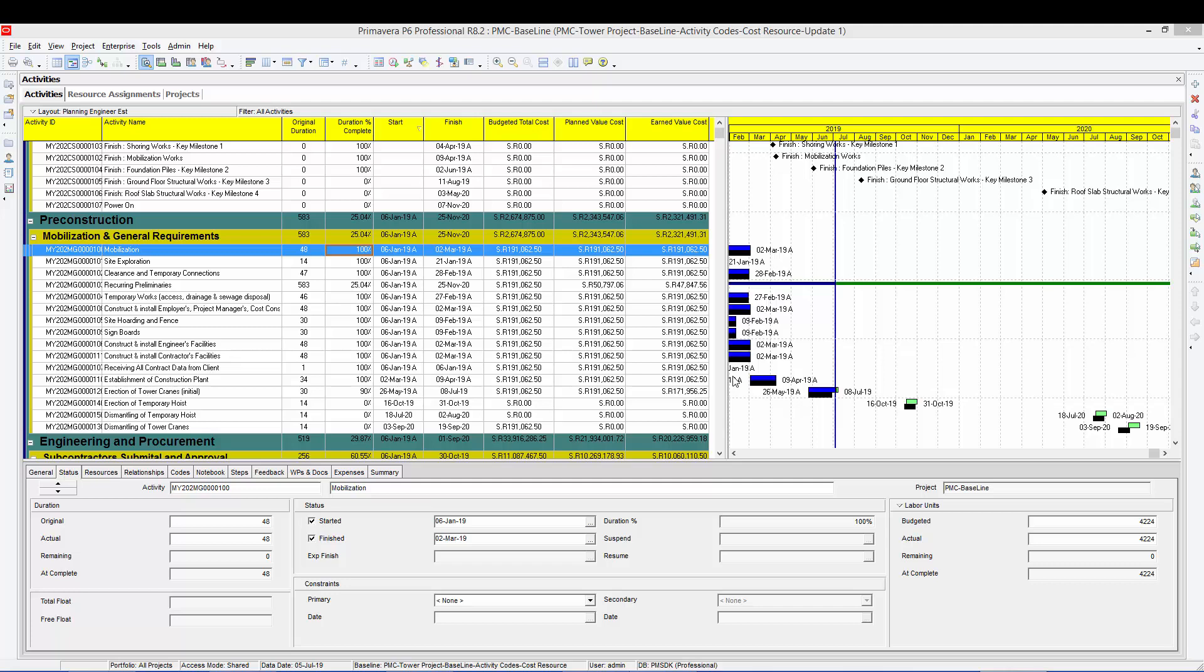If there is delays, where it happens, in which week. And this is very useful if you are preparing a claim or such investigation. If you want to know the delays of the project, when it happens, in the traditional way using Primavera only, you have to open all the files, all the updates and see the planned value earned value in each update. But in our system in this course, we will know exactly if there is any variances in between the planned and the earned value, we will know without opening all the files.